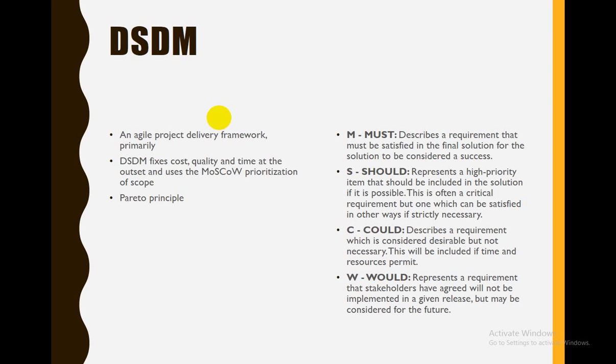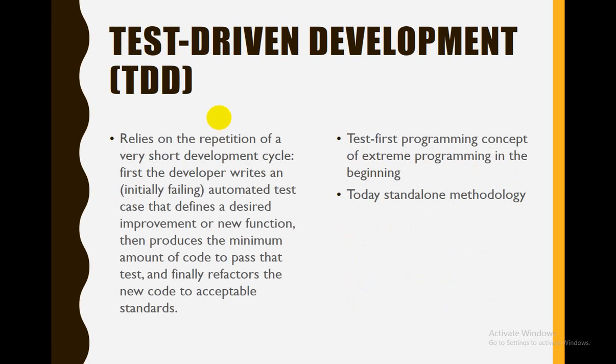Identify what needs to be done. So when we go to the business and say these are the list of requirements, what should we do? They say do everything. But in order to prioritize, when we start asking for each item's price value in terms of time as well as budget, then they identify the ones which are the must do for them, and slowly it comes to the should do and the could do, and eventually future projects, what they would do.